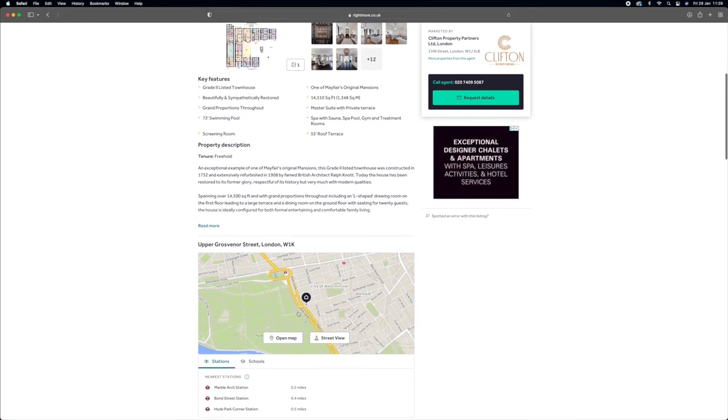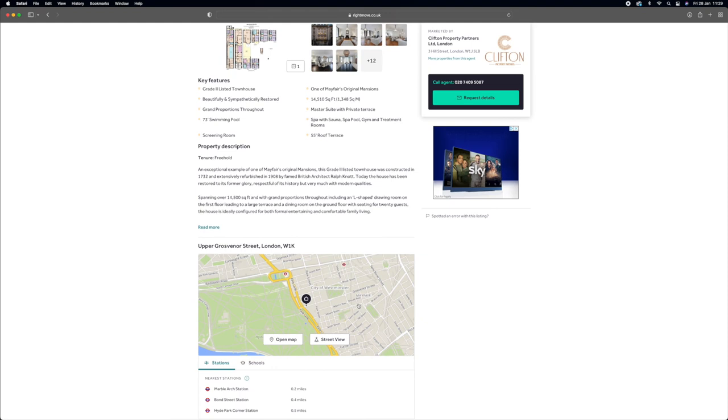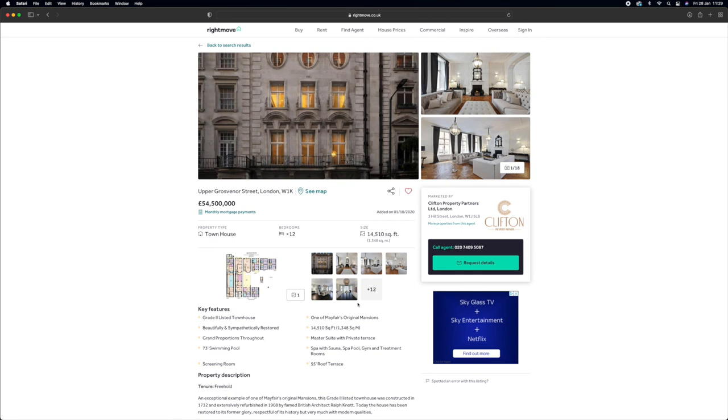Location here. So we've got Park Lane here, Grosvenor and a hotel, Hyde Park. So resale value, 54 mil. I reckon the build cost, they would have to sink in at least £500 a square foot, easily. 500 quid a square foot to do the build. So £500 a square foot times 14,000 is £7 million build, plus VAT.